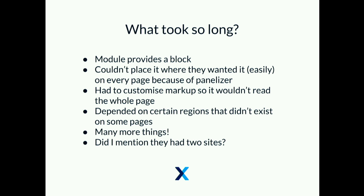What the heck took so long? A lot of things. Basically, the module provides a block. We couldn't place the block exactly where they wanted on every page because we were using Panelizer. We had issues with regions — it relied on a region that didn't exist on certain pages. Every time we thought we were done, they kept coming back saying it's not on the search page, it's not on the landing page. It was just a never-ending cascade of continuing effort. And the final nail in the coffin was they actually had two sites, and we had to add it to both in the five hours, which just didn't work.